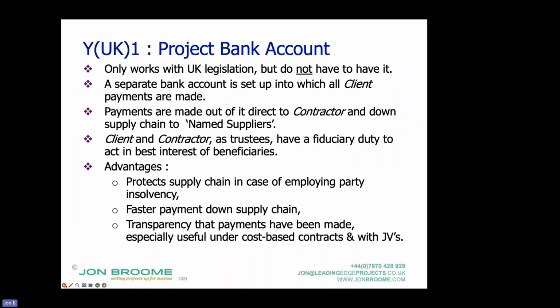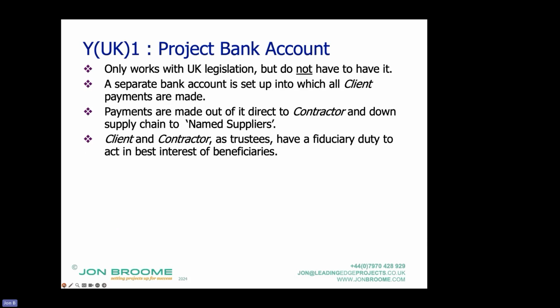So what's why UK 1? It's the project bank account. You don't have to have it. How does it work? A separate bank account is set up into which all client payments are made, including to the contractor. So they have to go via a bank account to the contractor. Payments are made out of it direct to the contractor and down the supply chain to named suppliers. So the money doesn't go through the contractor.